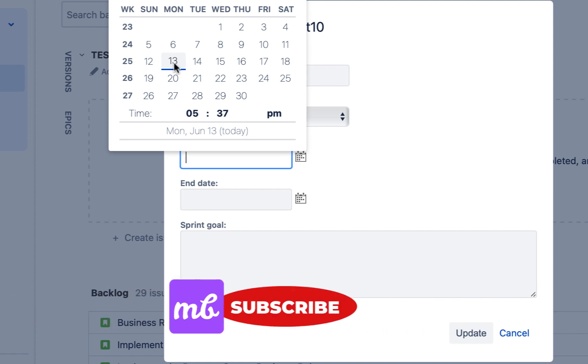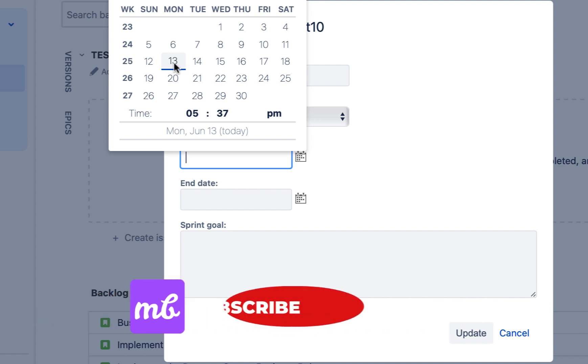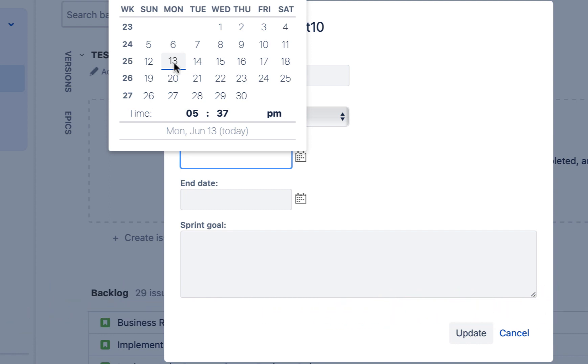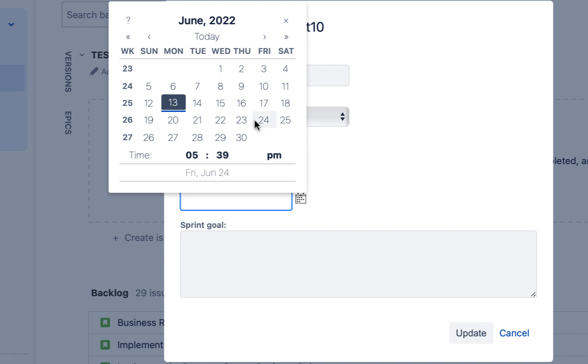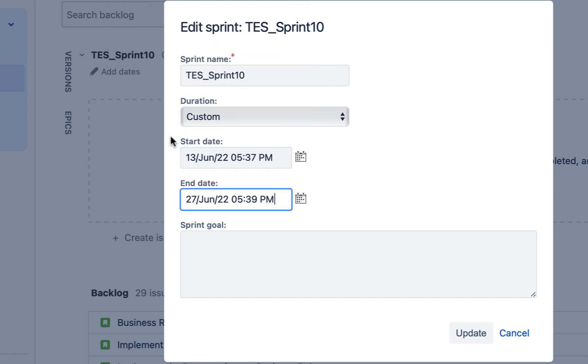But there can be certain exceptions as well. For example, in December, there are a lot of holidays. At that time, you can change the size of your sprint with the consent of your team. Okay, so let me provide them a certain date.